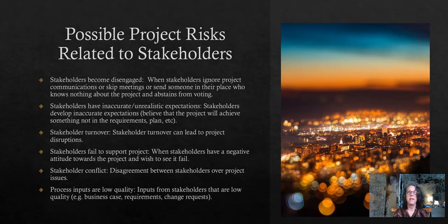Okay, now moving on to stakeholders. So because the stakeholders didn't have a history of collaborating, they had this history of competing with each other. Many of these project risks related to this project. And also, the longer the project went on, the stakeholder commitment started dropping. It just continued to go lower and lower and lower.